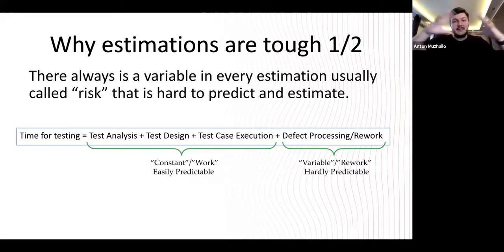If we take the entire testing work, it usually comes down to 4 pieces, right? The first piece is test analysis. This is the phase where we're analyzing the requirements, thinking about the general solution of testing, doing some test planning, trying to prepare some test approach, etc. This is comparatively simple, so we can actually estimate this time. And if we miss some estimation here, it's not a problem, because test analysis is usually a pretty quick activity. It may take like 3-4 days, a week, or maybe 2 weeks. So if you miss 1-2 days, not a problem, right? It's not a big deal.